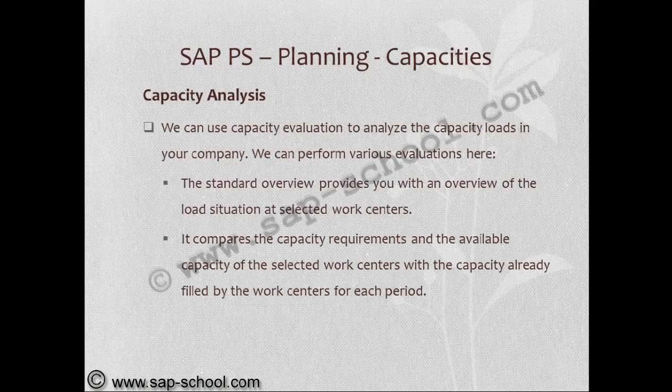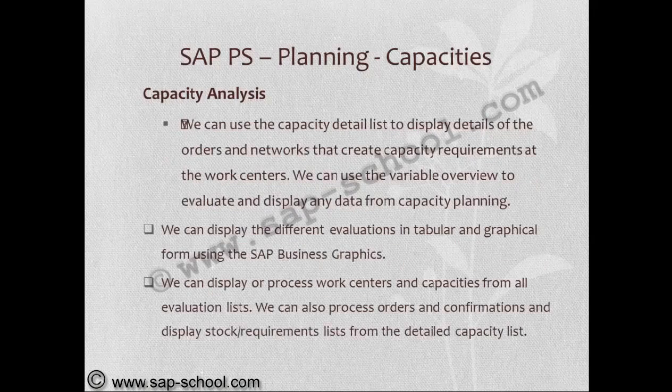We can use capacity evaluation to analyze the capacity loads in our company. We can perform various evaluations here. The standard overview provides you with an overview of the load situation at selected work centers. It compares the capacity requirements and the available capacity of the selected work centers with the capacity already filled by the work centers for each period.